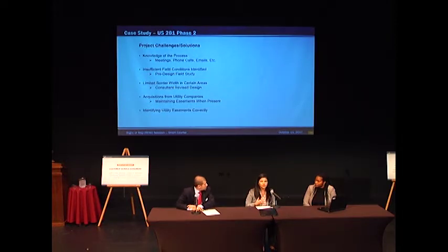So this could be a challenge because, as you know, utility agreements have to be executed before we start construction. So one of the ways that we are dealing with this issue is really getting the consultant and the utility owners to verify the easements early on at the schematic phase. You know, bringing in all the stakeholders and making sure that they submit the documents early on.